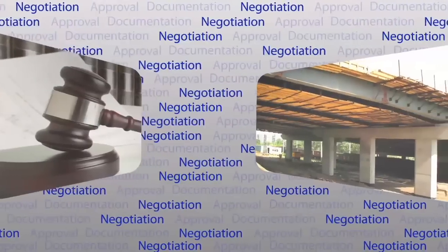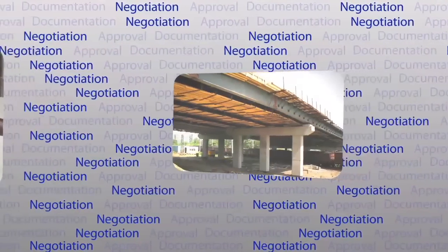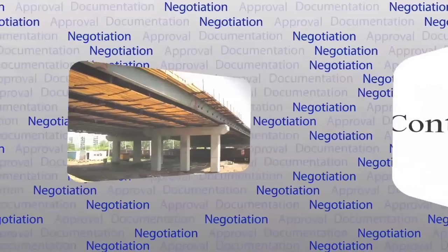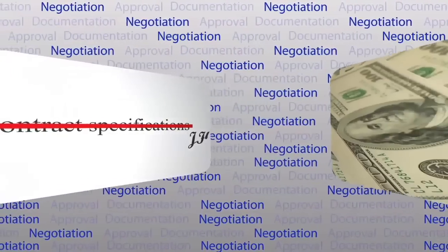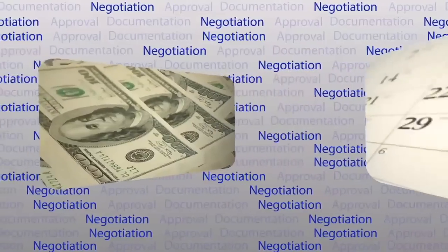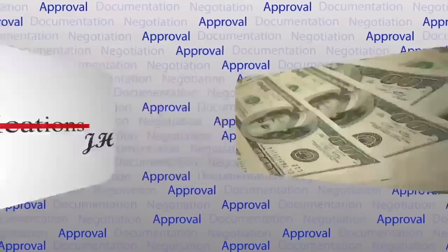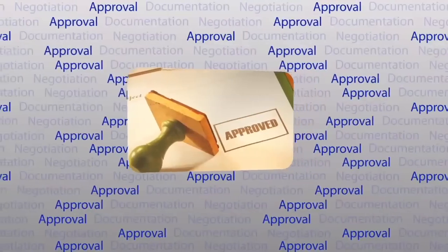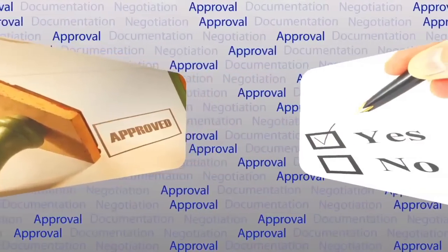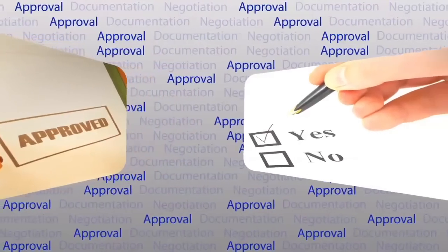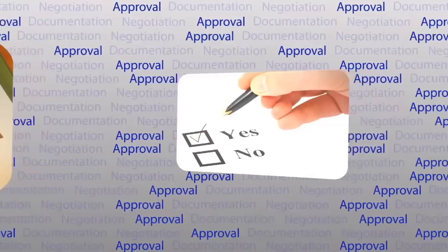A change is normally negotiated with the contractor. The change order will reflect the final agreements on what work will be completed, any specifications that are modified, deleted, or added, cost revisions, and time adjustments. Finally, a change order must have the approval of the oversight agency for it to be accepted as part of a revised contract. At this stage, the oversight agency makes a determination of allowable federal aid participation.